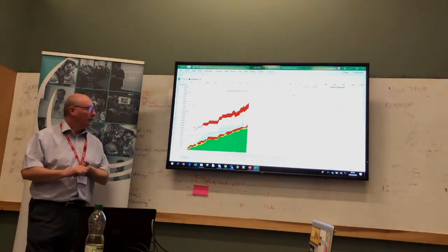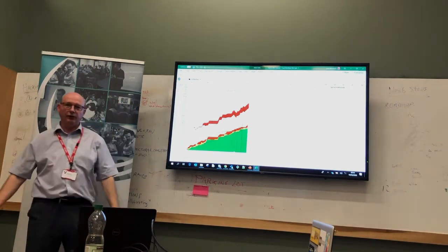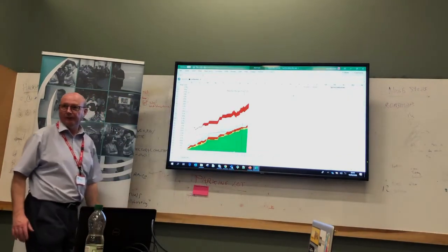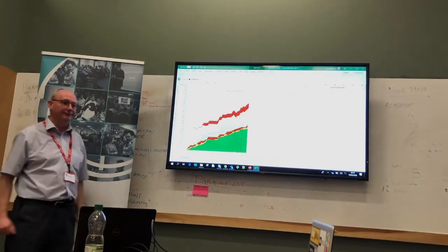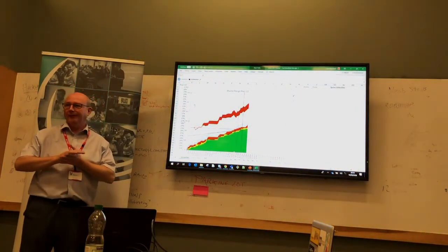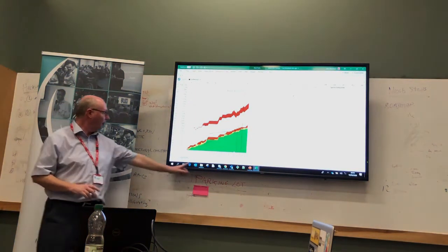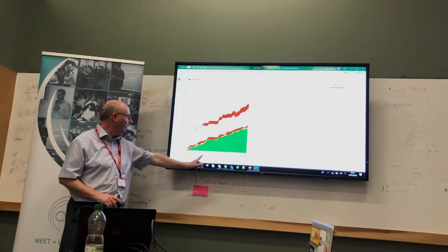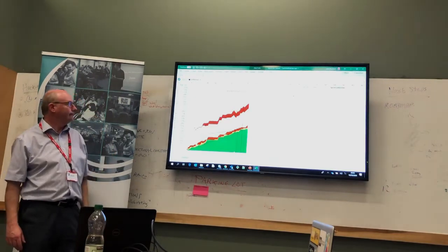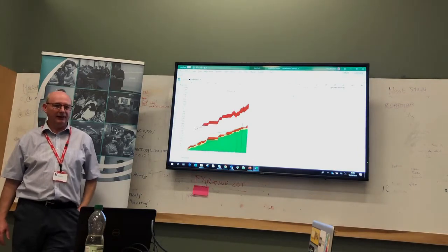So by the time we've got to about here, we know that we are not going to manage 0.4 and 0.5 by the 6th of March deadline, because Sainsbury's investment year ends on the 6th of March. And the product owner had said, I have to have something live before the 6th of March. So by the time we got to about early December, we were saying, Kev, we're not going to manage 0.4 and 0.5. Can you cope with 0.3?